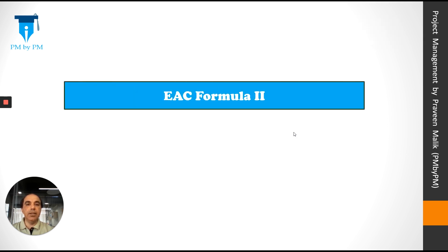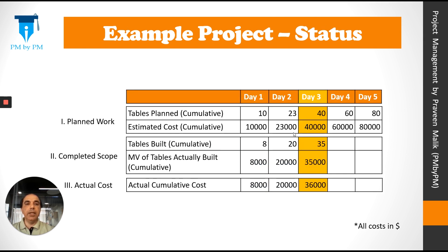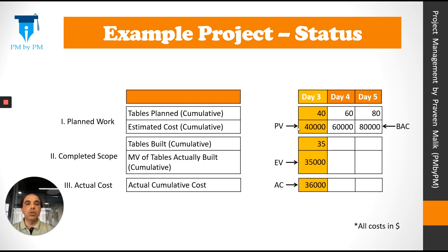Let's look at another EAC formula using our example project. Our plan was to build 80 tables in 5 days with an estimate of $1,000 per table, so the total project budget or BAC was $80,000. On day 3, we had to complete 40 tables but actually completed only 35 tables, and the cost of building those tables was $36,000. So PV was $40,000, EV was $35,000, AC was $36,000, and BAC was $80,000.